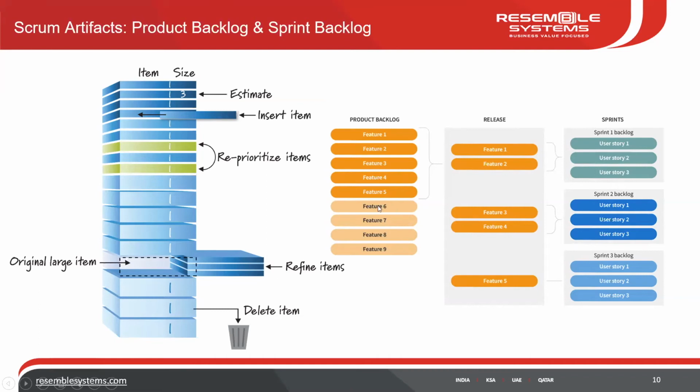It becomes very easy for the client, right, to say that I want this feature to go and I want that feature to go, rather than in a waterfall methodology or an orthodox methodology. The entire plan is actually derived right at the start, and then we sign off on the project plan. It is shared with the customer, and then we try to stick to it.